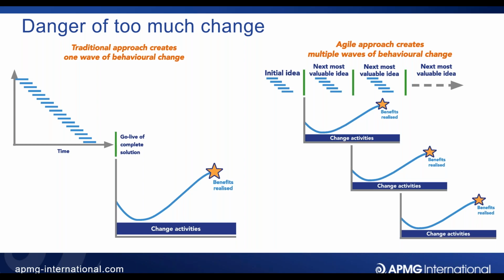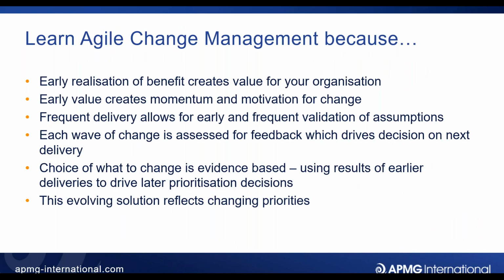And I have made a promise to them that as they are psychologically going through those multiple change curves, I'm going to give them, as early as possible, real tangible change to engage with. So whenever I can release new equipment to them, whenever I can do a demonstration of a new system capability, whenever I can give them early insight into the new ways of working that the organisation is bringing on over the next few years, I will do that, because I think it will match the pace of their psychological multiple changes. And that's gone down a storm. So I think we have to be aware that there are multiple changes, but that it's not always a disaster when we do that.